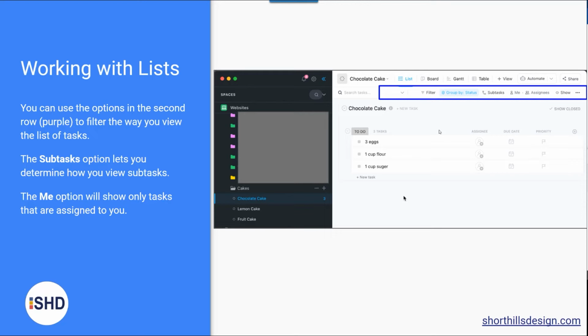One of the things that you're going to have to deal with in ClickUp is whether you want to use checklists or you want to use subtasks, or a combination of the two. We did all subtasks, but it slows down ClickUp. Sorry, ClickUp support, it just does for us. Then we used checklists, but then certain things, like what if I send out the discovery form to the client, check it off, and then follow up with client in 7 days to make sure they haven't filled it out yet? You can't add a date to a checklist.